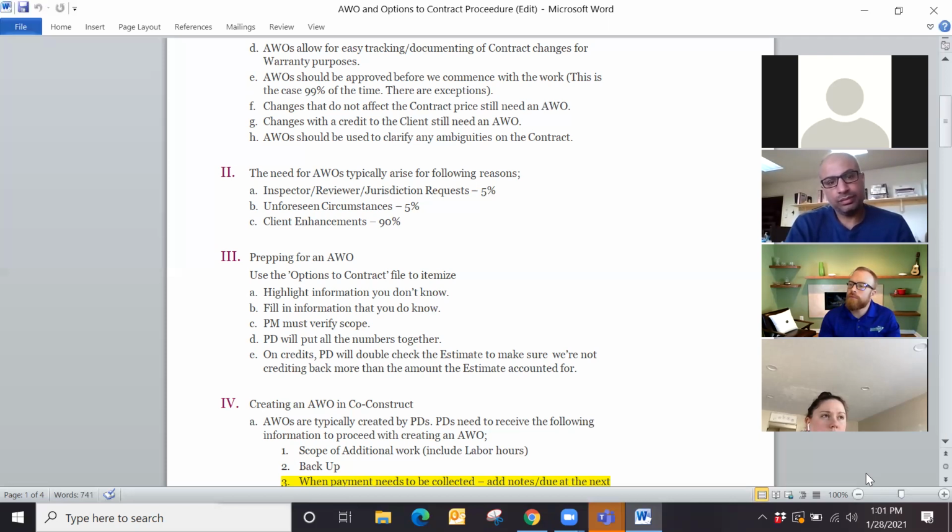So what happened with the exhaust fan? I just saw a message come in saying order another, but we wouldn't do that without an AWO. So what was the deal there? The deal is that I'll talk to Jennifer tomorrow and let her know that we need 3 rather than 2, because we ordered 2 at that time since we didn't know we would need 3. But as per code, we need 3. There's one bathroom that has a separate water closet that needs 2 separate fans.